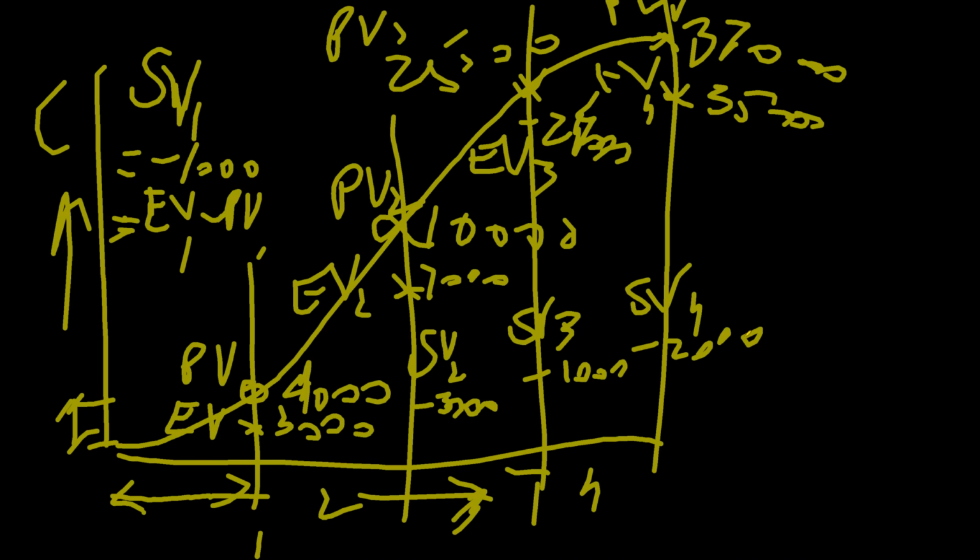Out of 25,000, I have a variance of only 1,000. So it is not really determinable. You see, 1,000 against 25,000 is probably a very good figure, whereas 3,000 against 10,000 might be a bad figure. You can't really put a face to it, but you understand one thing for sure, that negative